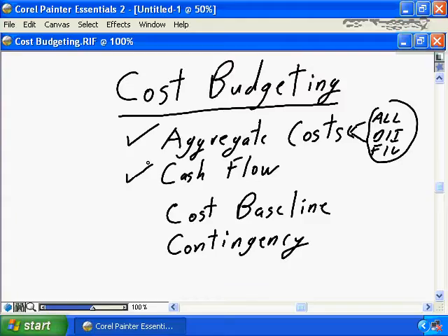You simply can't say as a project manager, well, you knew my project was going to cost $1.25 million or whatever the case is going to be. You should have been prepared for this cash flow. You need to provide a month-for-month cash flow that in this month my project will require 5. In the next month my project will require 10. In month 3 my project will require 6. But in month 4 my project will require 25 or whatever the case is going to be.